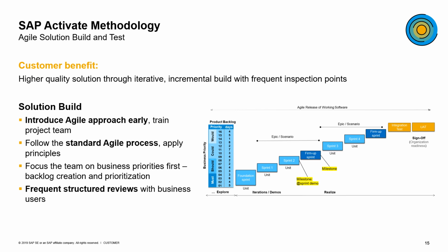The diagram on the right will show the release schedule. Our recommendation is to start out with the foundation sprints. Previously, we used to call these Sprint 0, but this is where we would initially do the review, prioritize the backlogs, and focus on what is needed to be done first in order to make the deadline.